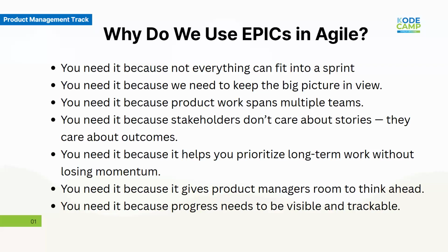And you have to fill your sprint backlog with them. Now, if you want to do them in one sprint, it is like trying to force an elephant into a very small suitcase, and that is not going to work. So what do you do? You create an epic. You give that big piece of work a home. You give it a space. Then within that, the team can take it on in chunks that actually fit into a sprint.